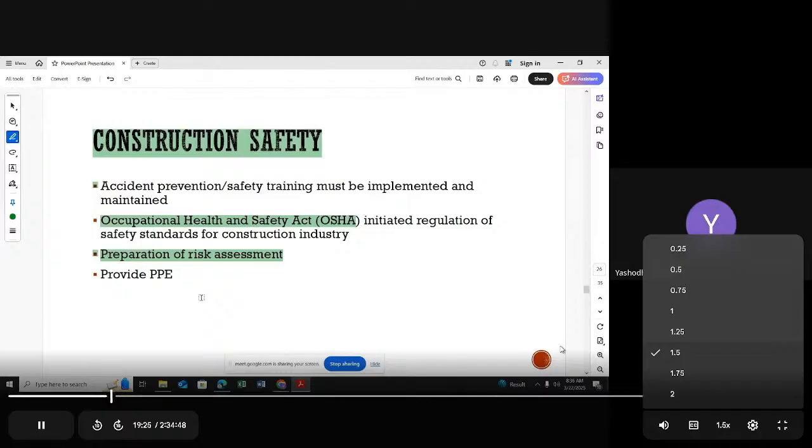Right? If anyone falls down from the project building and it affects that person's life, sometimes we have to close the project 100% for some period of time. According to the regulations, until completing the investigations, we have to stop the project. From one side, it affects the person's life. From another side, it affects all the progress of the project.